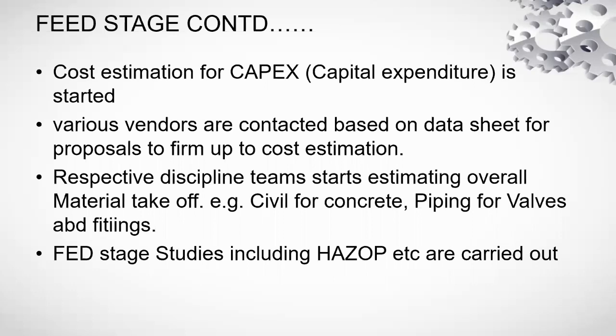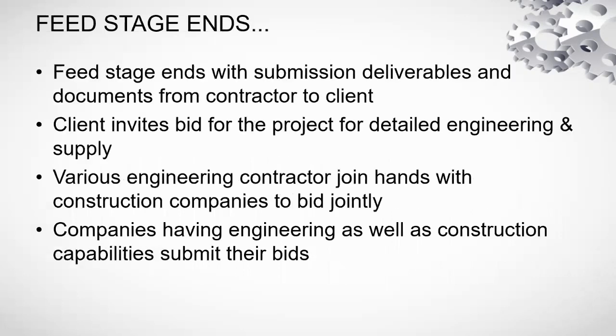Yes, FEED stage studies do involve various studies, including HAZOP. They are also planned and carried out in the FEED stage. The FEED stage usually comes to an end with the submission of deliverables and documents from the contractor to clients.